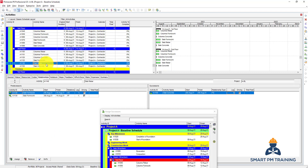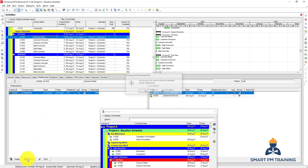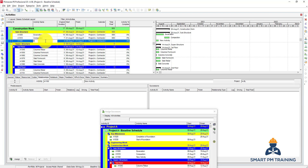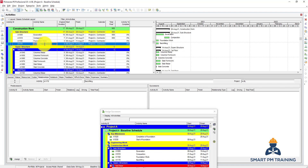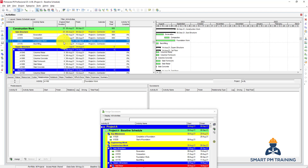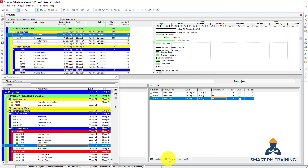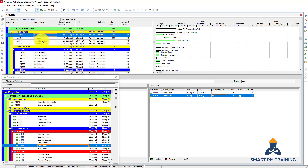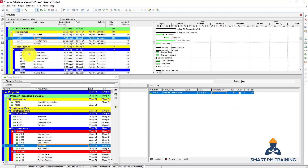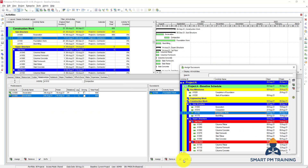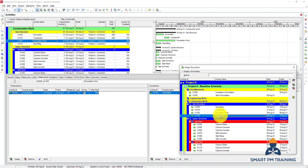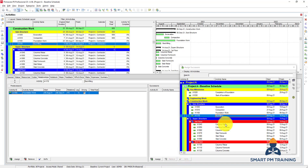So it's a really quick shortcut to copy activities. Let's remove the compaction because it's wrong. Let's have foundation work after compaction, and then backfilling. There should be a slab on grade as well but I will skip that since it's not critical. For foundation work I will have 25 days for all rebar, formwork, and concrete work; backfilling seven days; excavation and compaction with five days overlap. For the compaction-to-foundation relationship I will use finish-to-start. Then I'll click Go To and choose backfilling, and after backfilling I will choose columns-rebar.